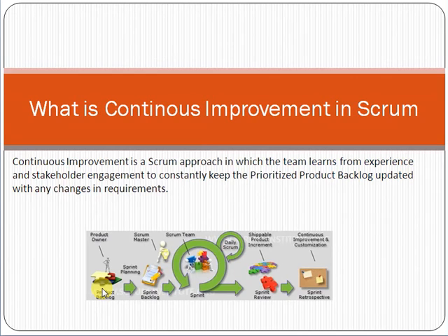After the daily stand-up meeting, we do the sprint review meeting. In the sprint review meeting, we showcase our work to the product owner, to the customer, showing what we are going to deliver. And again, it is a learning procedure and an improving process, because we all learn from these experiences: what the customer wants, what we shouldn't have to do, and what improvements are needed in our product, in our project. So again, it is a progressive approach in which we all feel that we are learning and moving forward.